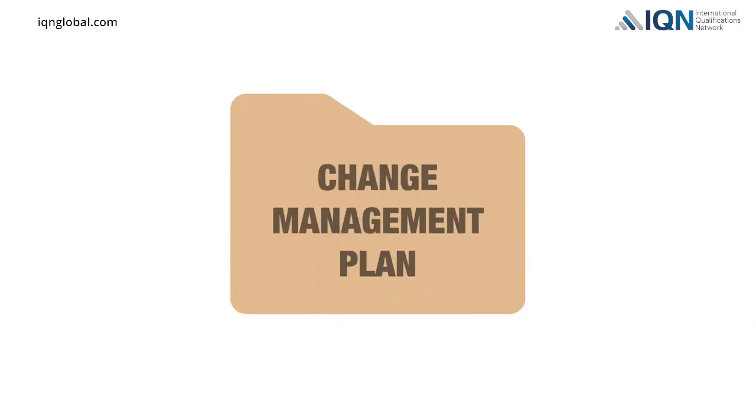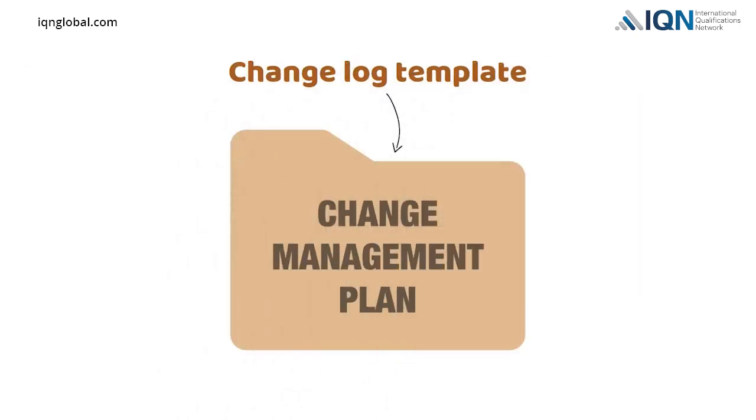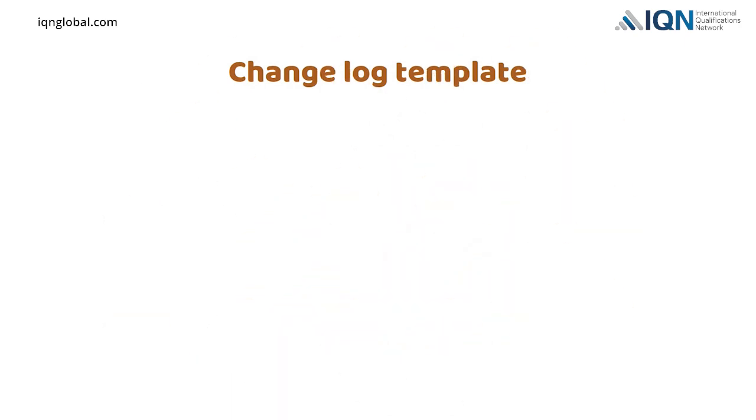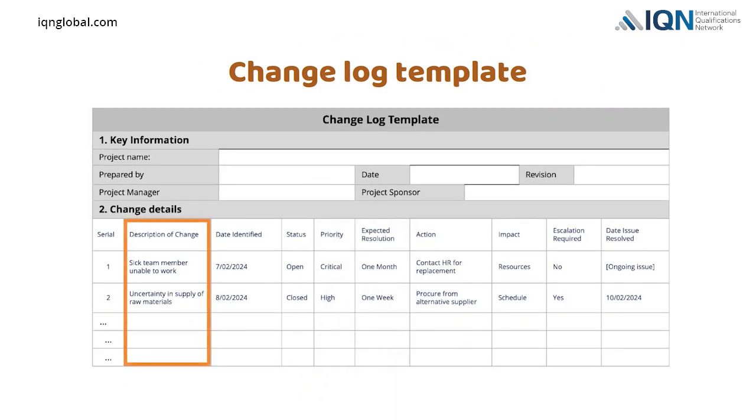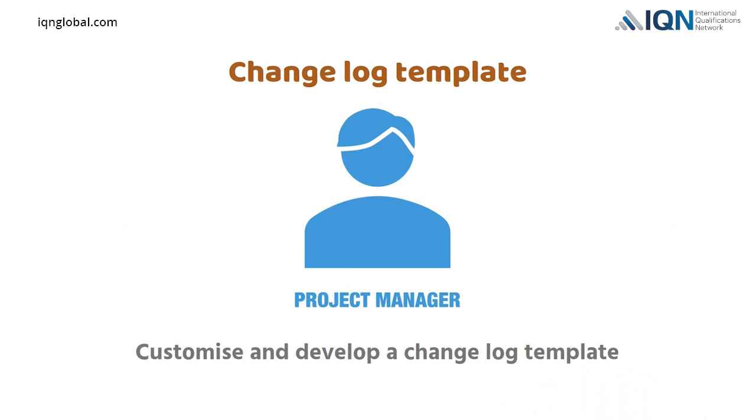An important component of change management plan is to introduce a changelog template. A changelog template is a document that captures change as it happens and tracks those changes throughout the project lifecycle. A project manager can customize and develop changelog templates depending on the nature and requirements of the project.